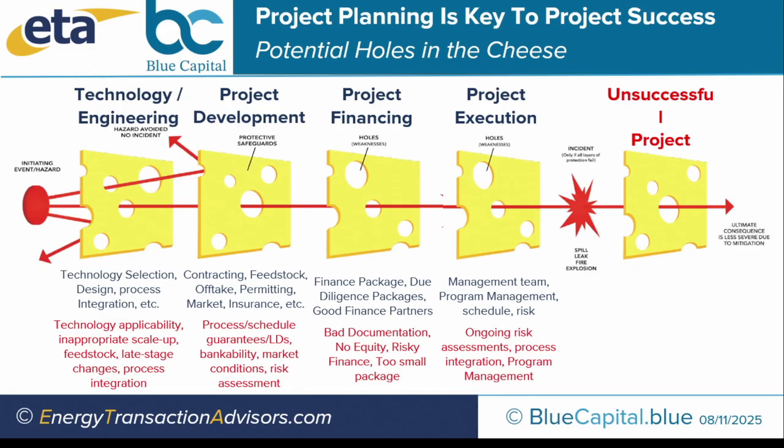Yeah. Then after that, in order to build a project, you need to get it financed, you need to get it funded, so you go out for project finance. Yeah. And that's including a data room. And so your data room is pretty comprehensive, but if it's too comprehensive, it's too much. So you have to be very specific about what goes into your data room and how people have access to that data room, because it's also very sensitive information. So we've seen a lot of data rooms that are just a mess, and financiers take one look at it and go, oh no, I'm not going in there. And you usually don't get a second chance. No, you never get a second chance.